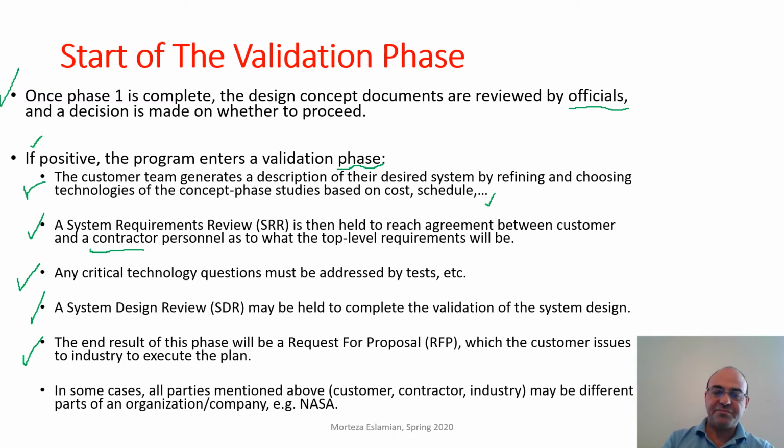But let's say that, especially with current projects like the Artemis project, the program of coming back to the moon, it's been done this way. NASA defines different stages or phases of the program, and then prepares proposals, and usually private small, medium or large companies bid on these proposals and get the contract. So instead of doing most of the work in-house, NASA is now sourcing out the work to get private companies involved as well.